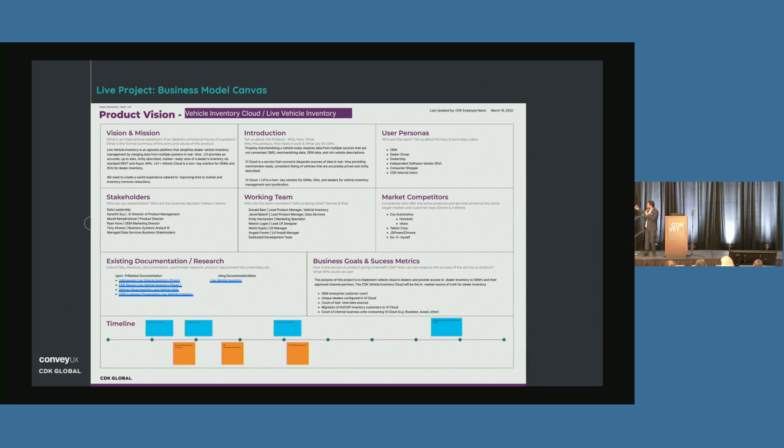And when we started putting timelines to it, the moment a person who is working on the ground on that project will come back to you and say, hey, you have mentioned that everybody will do a single sign-on. We don't even have an infrastructure that I can do a single sign-on. Now, these realities come faster to you, and you are doing a more practical planning where your plan is very close to the execution model or what you want to achieve.